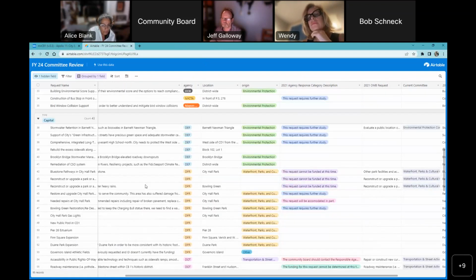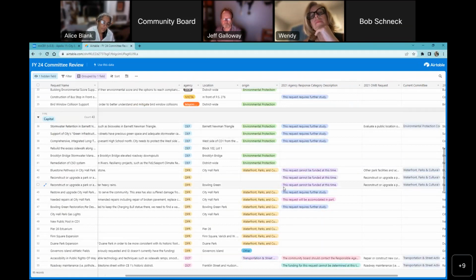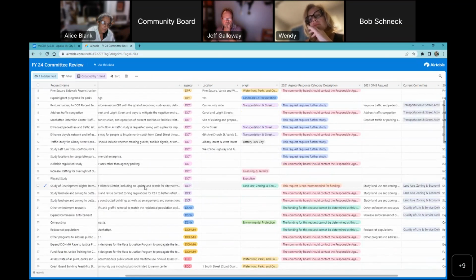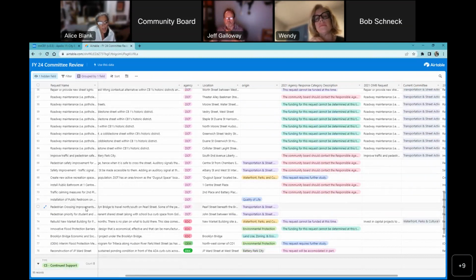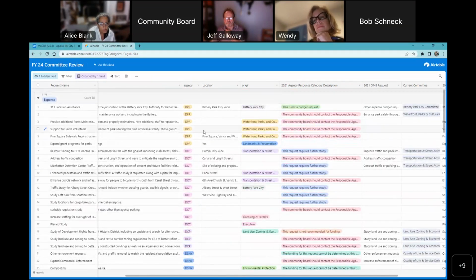What we try to limit, to be selective, are the expense items and the capital items. Now, this committee really dwells in the area of capital budget items. In terms of expense, the things that I can think of immediately are maybe funding the teams to deploy deployables. But for the most part, where you dwell, this committee really is capital stuff. So stormwater retention, resiliency, they're all capital items. But is planning a capital item? Planning, yes, planning does fall into expense. That is a soft cost, yes.